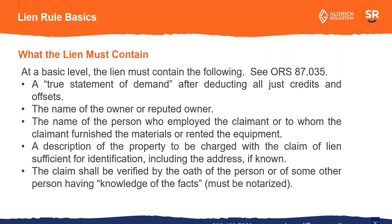The basic level of what the lien must contain: you need to provide a true statement of demand after deducting all credits and offsets. You also have to include the owner, the person that you contracted with, the description of the property — the address if you know it and the legal description if you can get that. Sometimes people will attach a map and circle the property. The claim has to be verified by somebody who has knowledge of the facts — it doesn't need to be somebody who was actually on the ground, it can be somebody that works in the office. It cannot be your attorney or the lien service, as they don't have knowledge of the facts. It also needs to be notarized. Good thing is there are electronic notaries available now, so it's not as much of a pain as it used to be.